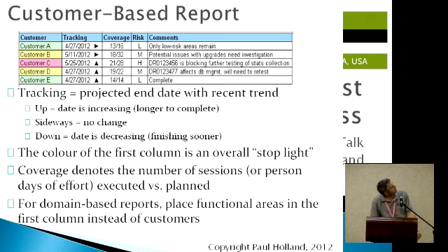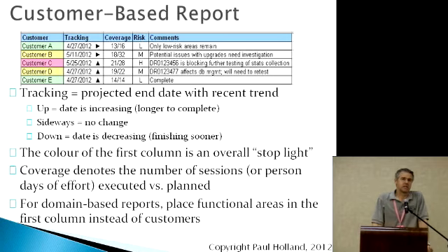The part that I really didn't like about this was the coverage section, which had something like 13 out of 16 test cases executed. It was not really indicating the effort remaining, but the number of test cases remaining. Some test cases would take an hour to run, some would take 2 weeks to run. You can't really monitor them on a chart.